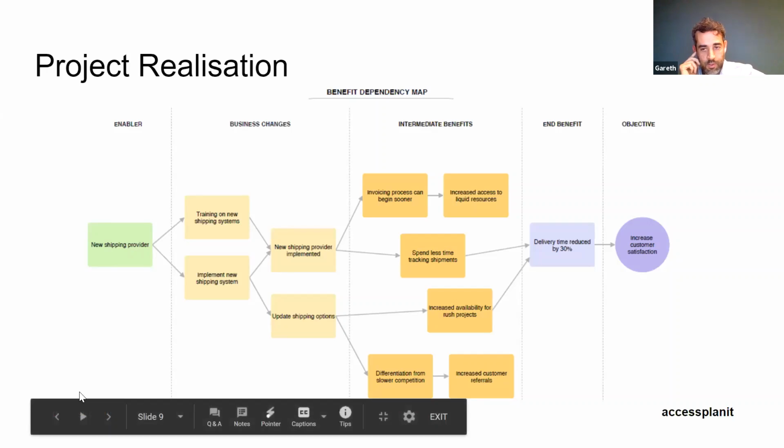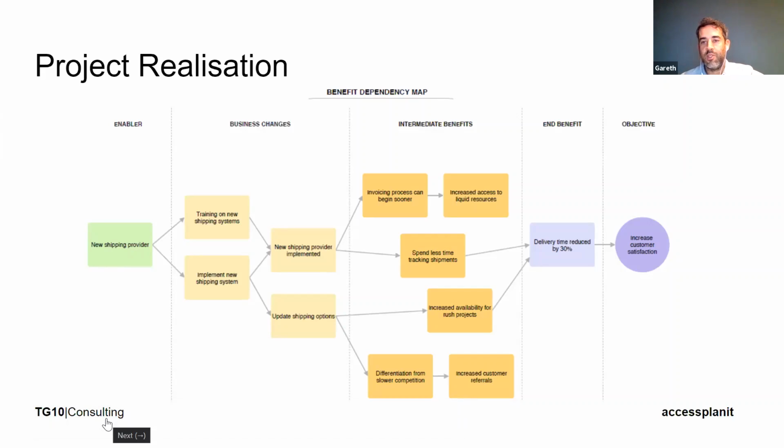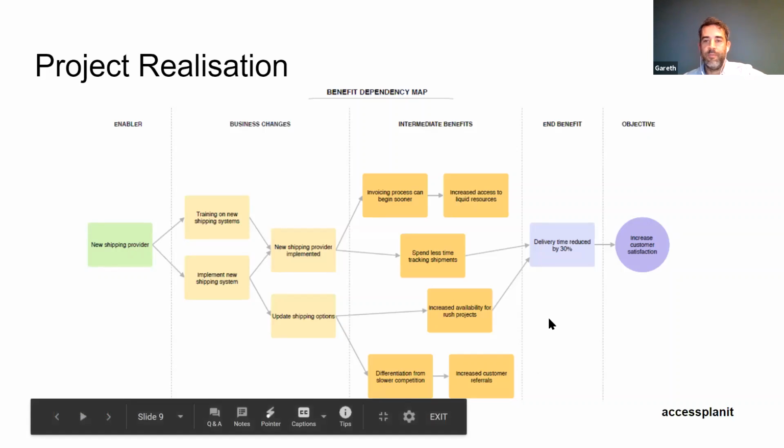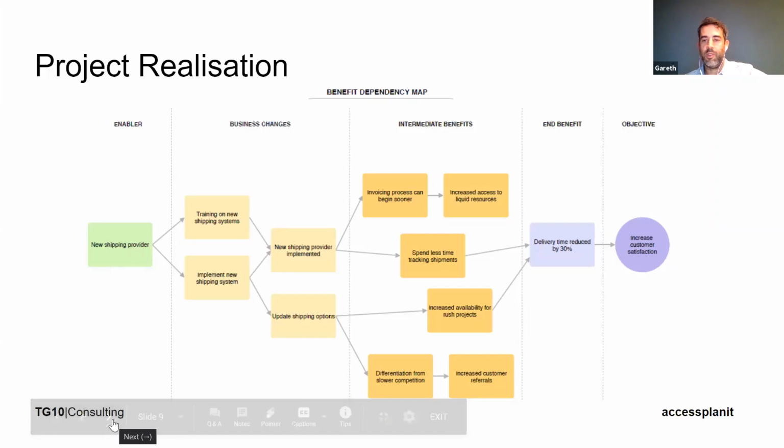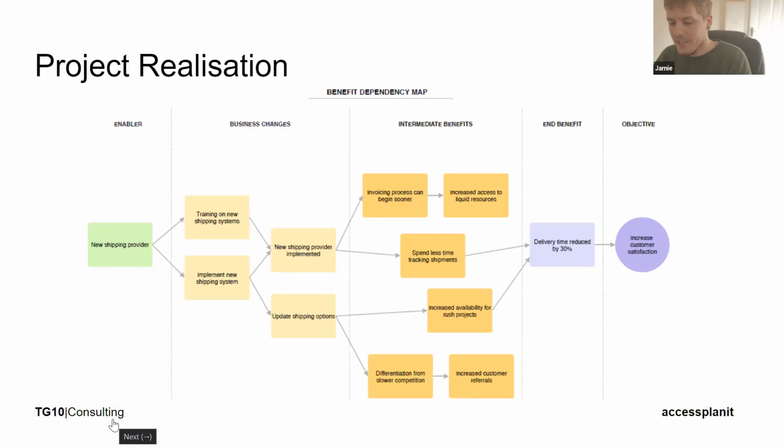Yes, good. I like the look of this. And obviously the business case, so all of the benefits that you were looking to achieve, ideally you mapped those out and captured those in the business case right at the start anyway, and it's something measurable, something that you can put some sort of metrics on. So yeah, ideally when you get to this point, you are showing that you did what you set out to do. Yeah, definitely.